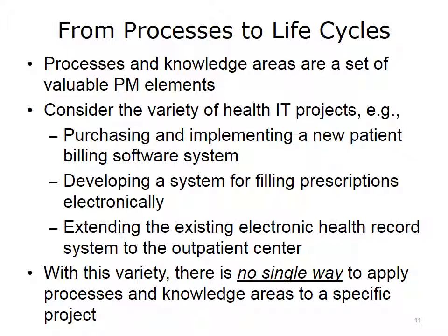So when we talk about transitioning to life cycles, we're saying that the structuring of the project over time is what is actually addressed by the project life cycle. It will be an important challenge for you as a project manager to develop an effective structuring of these activities over time. Now we will begin talking about possible life cycles for your health IT project. For large, complex, multi-year projects, you may have one life cycle that goes throughout the entire project, and then have multiple phases which are smaller, individual life cycles that fit within that project. But overall, these smaller life cycles are pushing the larger project along.